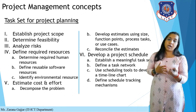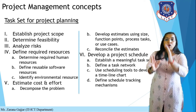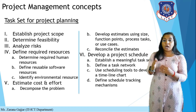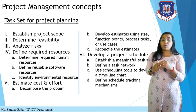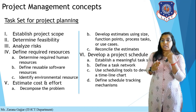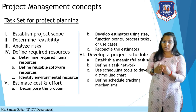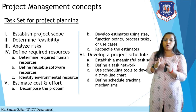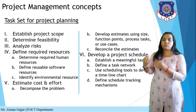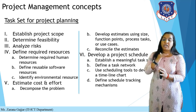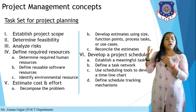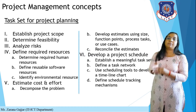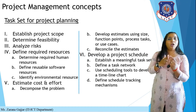You then reconcile the estimation. As a project manager, you analyze which costs can be reduced — for example, if a software resource already exists, you can remove it from the estimation cost list. The fifth step is about estimating cost and effort for the overall project.